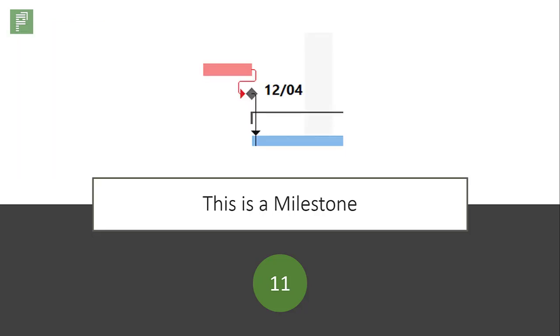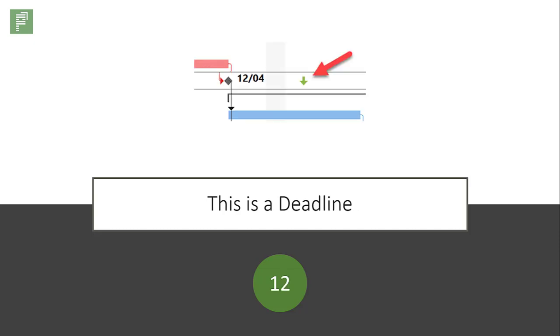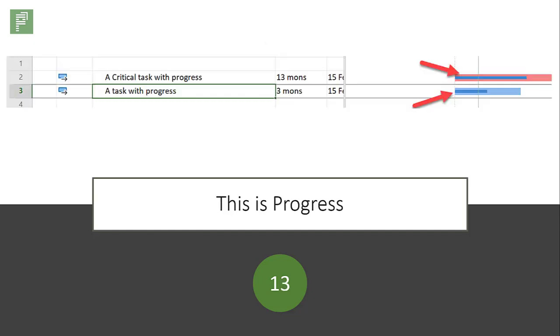This is a milestone. It moves dynamically with the rest of your schedule. This is a deadline. It doesn't move with the rest of your schedule.